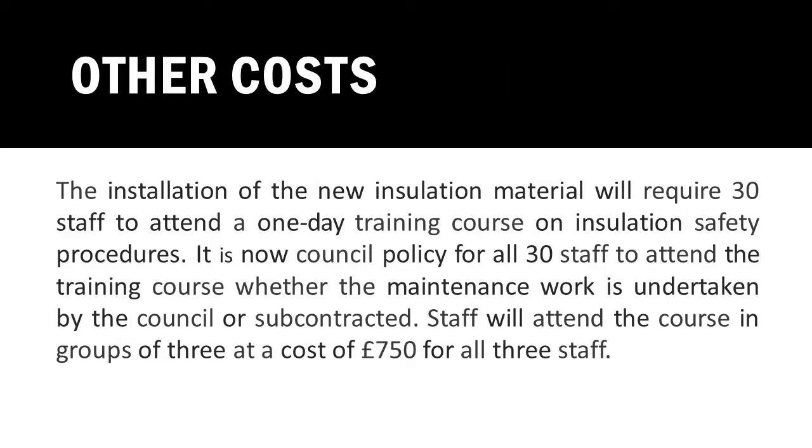Next point is the installation of the new insulation material will require 30 staff to attend a one-day training course on insulation safety procedures. It is now council policy for all 30 staff to attend the training course, whether the maintenance work is undertaken by the council or subcontracted. Staff will attend the course in groups of 3 at a cost of $750 for all 3 staff. We are going to do this course in both cases, whether we do the job or not. So it's not relevant. It's not an incremental cost.